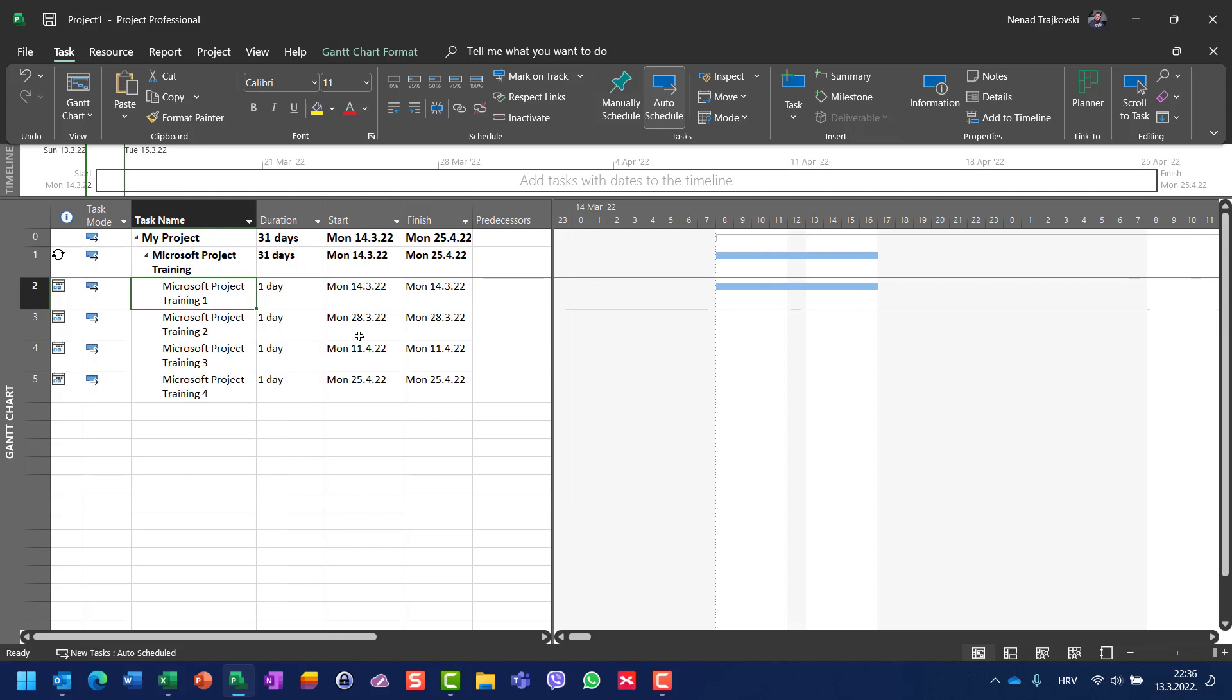From the 14th, when it will be the first occurrence, till—let me scroll to that task—then at the 28th of March, then 11th of April, and then finally it will finish at 25th of April. And that's it.